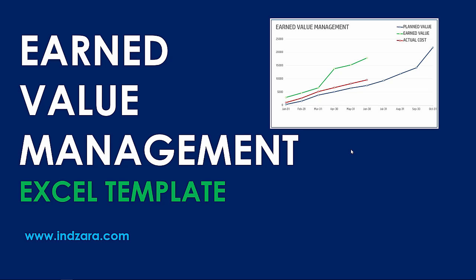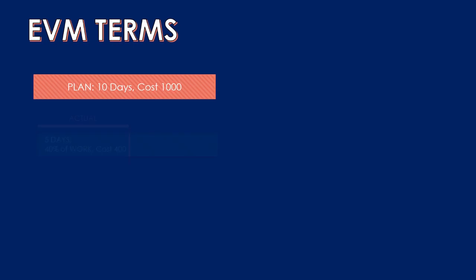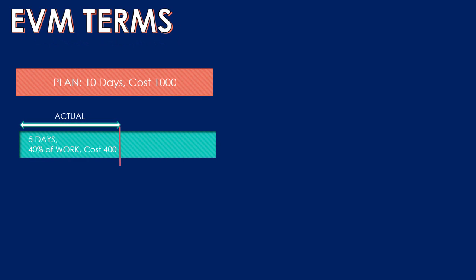Let's get started with a very simple example to help us understand how earned value management can be helpful. Consider an example project in the planning stage: according to our plan it is going to take 10 days of work and cost 1000. After planning, we begin the project and after five days of actual work we have completed 40% of the work and it has so far cost 400.